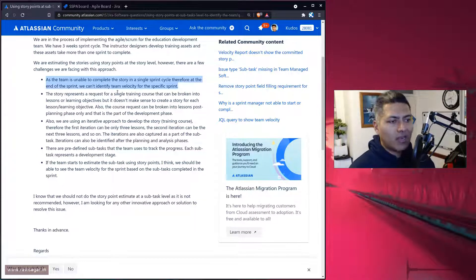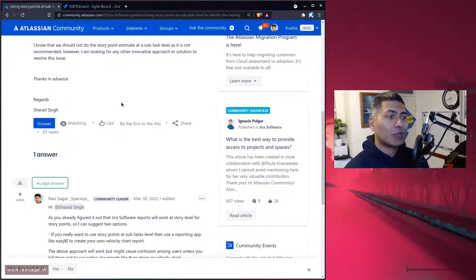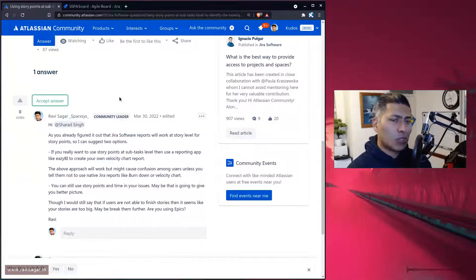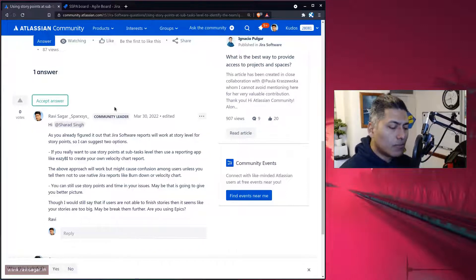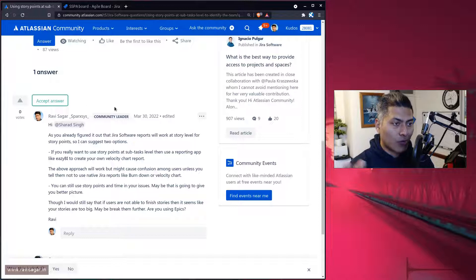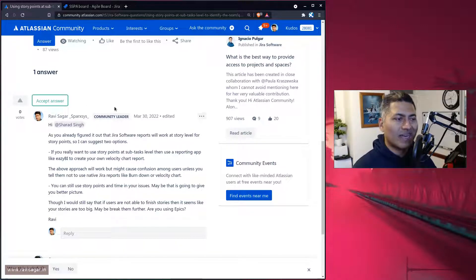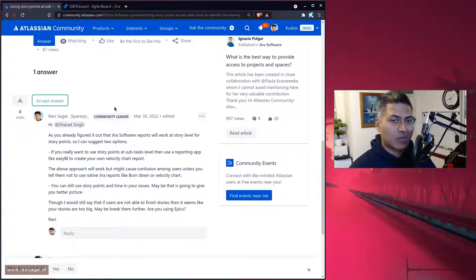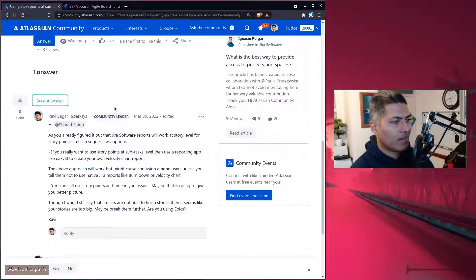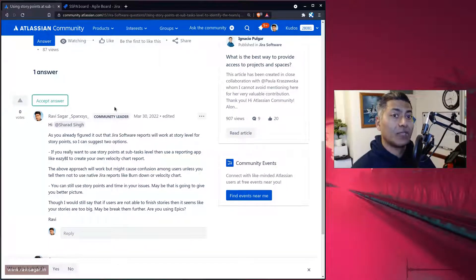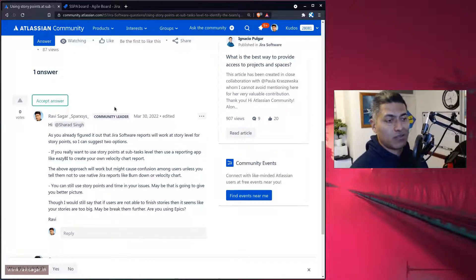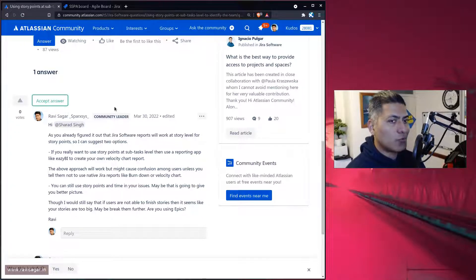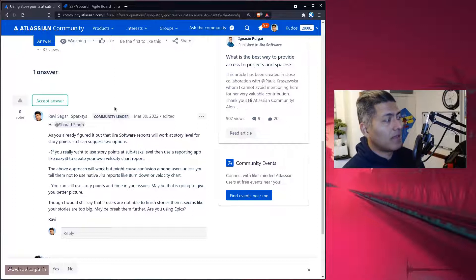Apart from all this, if you still have a valid reason and need to track at the subtask level purely on the basis of story points, you may need to build your own reports. The challenge is you can probably create a report in EazyBI that will roll up estimates from subtasks to stories to epics to higher levels. But you'll have to educate your users to go to the EazyBI dashboard instead of the native velocity charts.